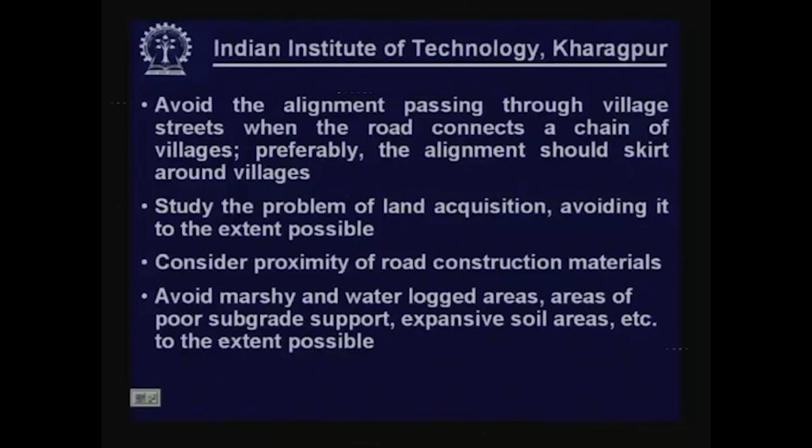Also, remember and try to study the problem of land acquisition, avoiding it to the extent possible. This is a major bottleneck for development of new roads. If we have to acquire land where there are permanent structures, even otherwise also, land acquisition is a major problem. So, while taking the road, keep it in mind that as far as possible you should be able to take the road without the need of land acquisition.